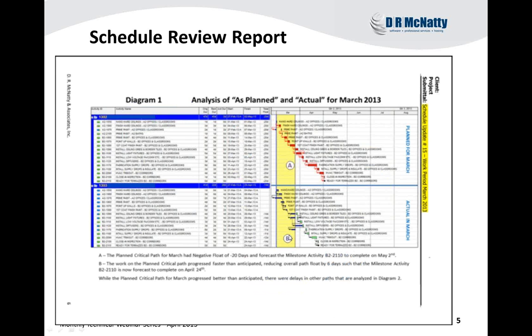client to understand. So, the basis of this diagram is a P6 Pro layout that has been annotated to bring attention to certain parts of it. I actually have two projects open at the same time. So I have a previous update and the current update, so I can compare a limited amount of the critical path, see what was planned for the period, and then what was actually accomplished. And then we usually will paste this graphic into the report itself.